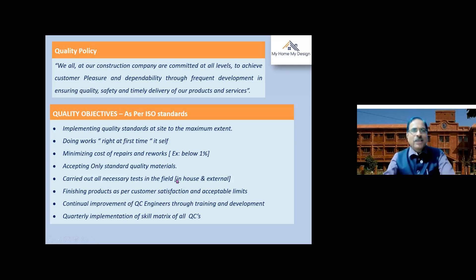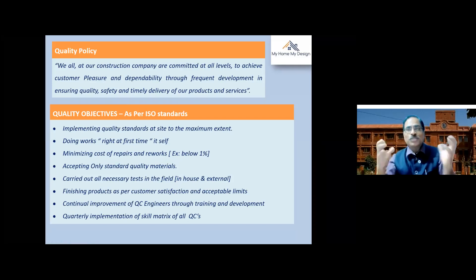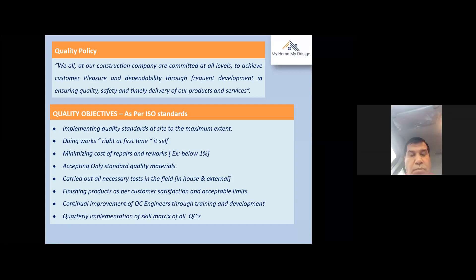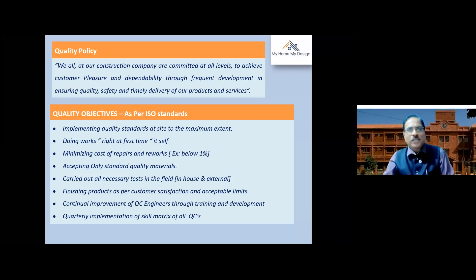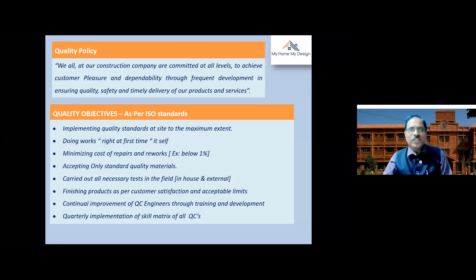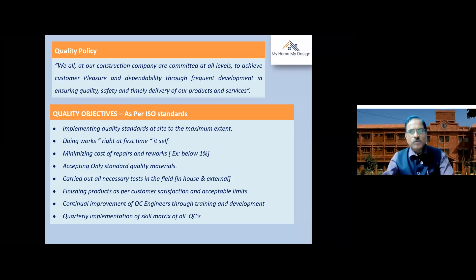Accepting quality standard materials only is very, very important. As a thumb rule in basic civil engineering, 70 percent is the material component and 30 percent is labor or workmanship. If 70 percent of the component is itself inferior in quality, we cannot give quality assurance for the construction. So we need to accept all standard quality materials right from excavation till handing over the keys. All necessary tests in the field, in-house, and external labs must be carried out.